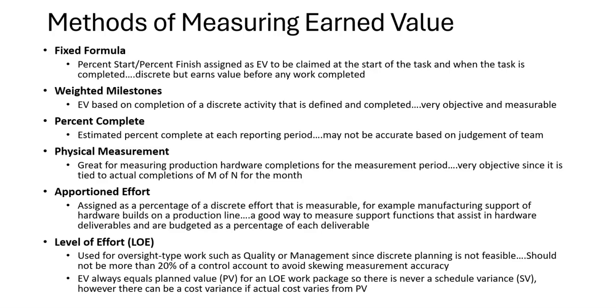The last one is level of effort. And this can be valuable because there are certain tasks where you really can't allocate how much time you'll spend, for, say, supervision, for instance. I don't mean floor supervision because that can be apportioned, but supervision of engineers. And you're overseeing what they're working on, and you're helping them, and you're doing reviews, and you're doing some mentoring. Well, that's hard to figure out exactly what you're going to do at any given time. It's kind of an oversight task, and it is essentially a level of effort that you're going to apply to manage your engineering design team.